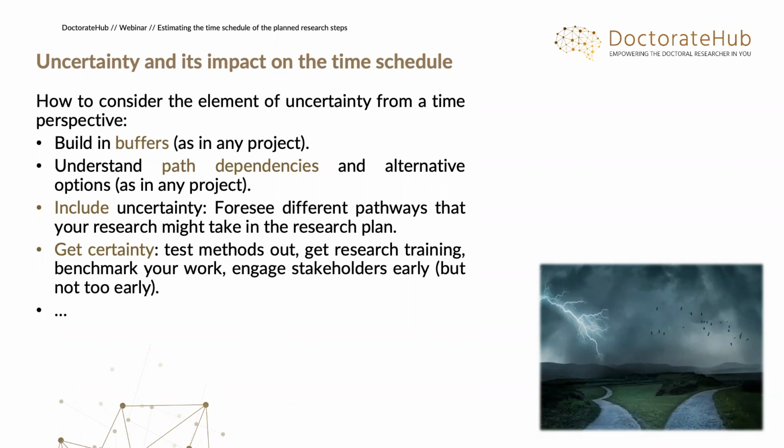In particular, if you have been doing a good literature review initially, then you are already aware of how research might progress. Like, okay, perhaps I undertake focus groups, but perhaps I also do interviews, and perhaps I also need to do other things. So do I do that in a sequential way, or do I do it in parallel? In case I run out of time, perhaps a pragmatic approach that can already be foreseen is to change from linear, sequential to parallel, right? If you have it already in your research plan, there will be no discussion later. And if there should be discussion, it comes at the right time, initially.